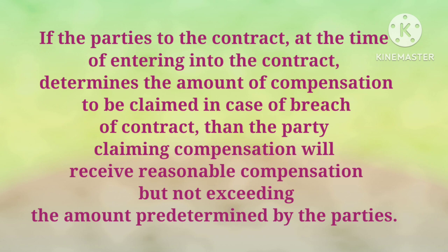To be noted that this is the rule regardless of whether the sum agreed to be paid is by way of liquidated damages or penalty. Hence, it means that the amount of compensation, if predetermined by the parties, is the maximum amount which the injured party can receive. That is, when the amount is already mentioned in the contract that such and such amount will be paid in case of breach of the contract, then the party claiming the compensation will receive compensation but not exceeding the amount mentioned in the contract.